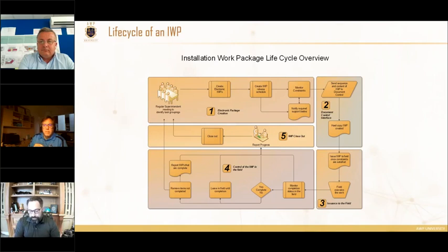Then when the craft pull that plan out to the field, they know what to expect. It may be a week or two's worth of work, and they can then break it down into the production planning environment, that daily plan type activity.